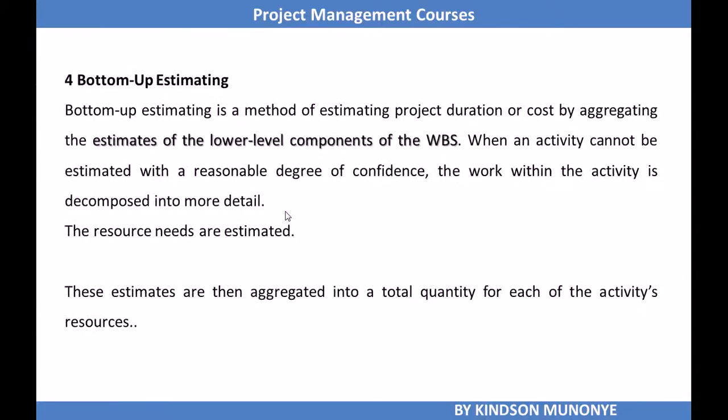We also have another tool and technique, and this is bottom-up estimating. Bottom-up estimating is a very important method of estimating, and it estimates the duration or cost by aggregating the estimates at the lower level components of the WBS. When an activity cannot be estimated with a reasonable degree of confidence, the work within the activity is decomposed into more detail, and then the resource needs can be estimated.